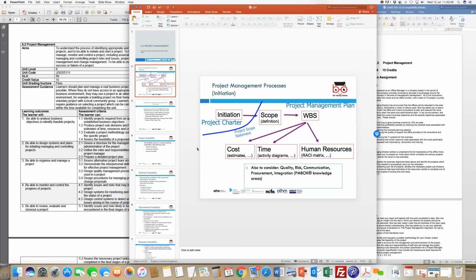So the basic remit of how you plan this particular event is going to be documented in something called the project charter. And the scoping of the project is going to be realistic. That means when you scope this project out, you're going to be realistic. For example, in your class, there are 20 students. So obviously, you're looking at calling maybe 20 of them, and you're going to be realistic that about 15 will attend. So the scoping of the project is a key part of project management and is classified as something called project planning.